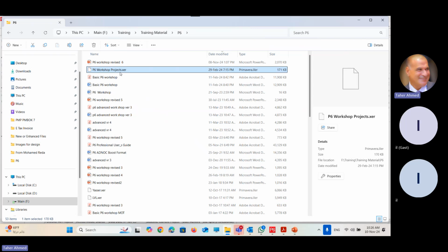At least, because sometimes you are going to connect one activity with more than one activity as a successor. In some cases, especially at commissioning and closing, maybe one activity is connected to tens of activities. In order to complete, I have to complete all this list of activities. So the predecessors could be 10 activities to one successor only, which is handover or closing the project.